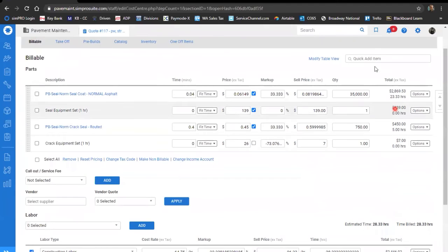Okay. And then what I need to do is break out my time. So that's going to be about 28 hours, 5 people, that's roughly about 6 hours. So I'm going to round up to 6 hours. Generally, the policy is to round to the 10th place.